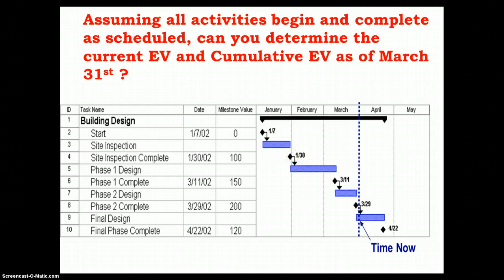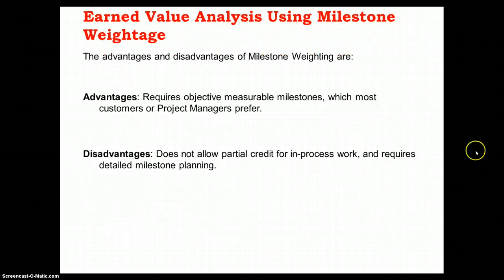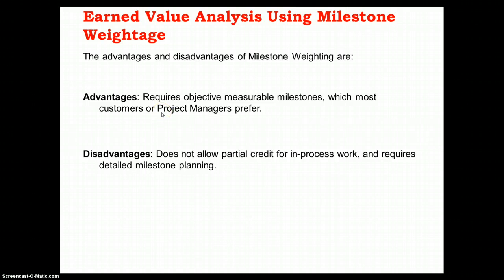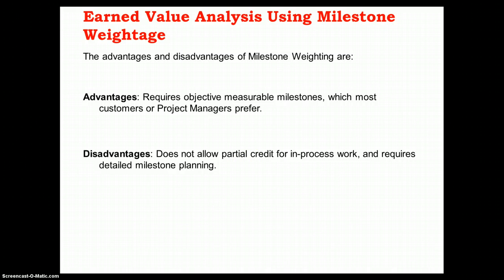This has been a brief overview of earned value analysis using the milestone weightage method. A key advantage of this technique is that it requires objective, measurable milestones, which most project managers and customers prefer. However, a key disadvantage is that it does not allow partial credit for in-progress work. It is therefore very important to ensure careful milestone planning corresponding to each accounting period, to ensure contractors do not suffer poor cash flow.